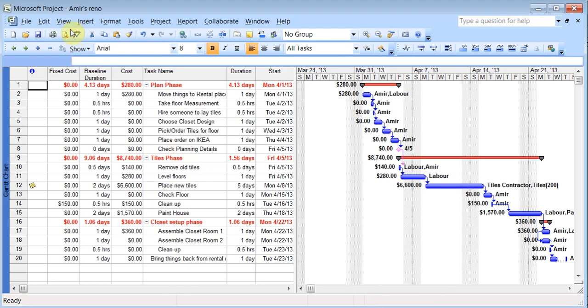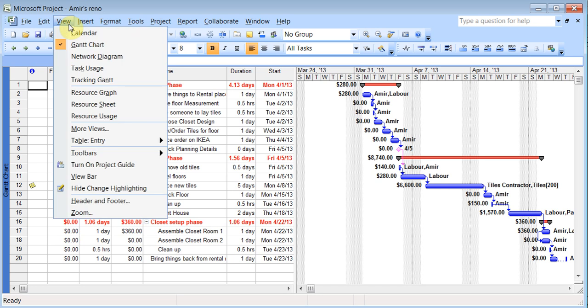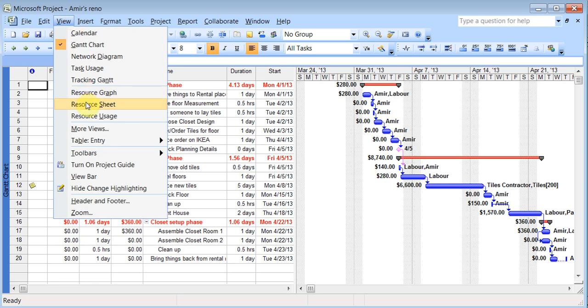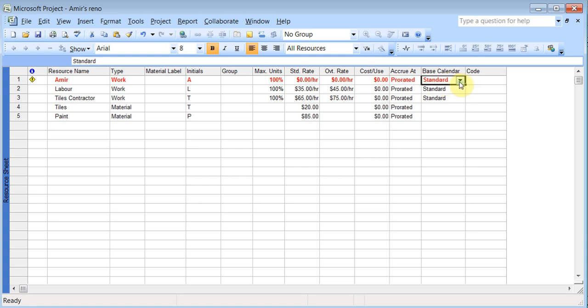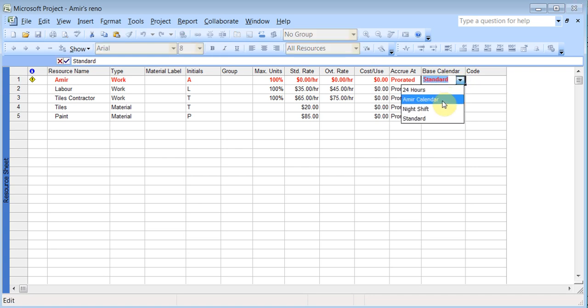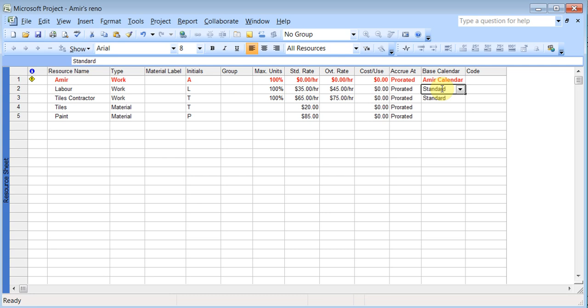Now I can go to view, resource sheet, and there is the calendar here. And I can change that base calendar to Amir's calendar. So this way, the project will know that I've got some special hours that I'm available to work at rather than everybody else being the same. So that's a nice feature.